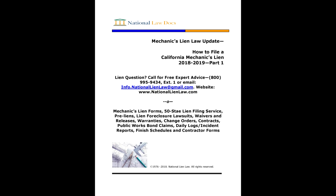You have to change or improve something, not just maintenance. In most cases, it would not be a problem proving this because the construction services are causing improvements to the property. But assume you're only replacing fluorescent lighting in the hallways of an apartment complex. Replacement alone is not an improvement, but if in the process of replacing you reinstall or repair some of the defective lighting boxes, it would be lienable. Or if you're a landscape company and are simply mowing, watering, or fertilizing the plant material, that is not lienable, but you can file a lien for the initial planting, installing an irrigation system, or putting in retaining walls, as you're making improvements. Other examples of lienable work would be janitorial cleanup of the construction project or trucking services where you're hauling away soil or debris.